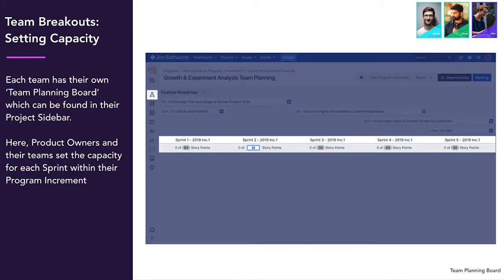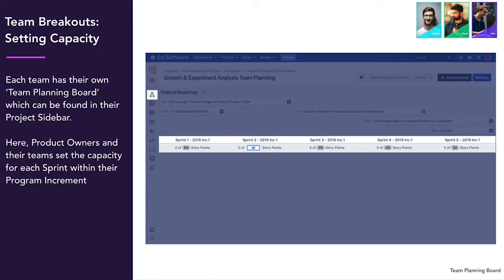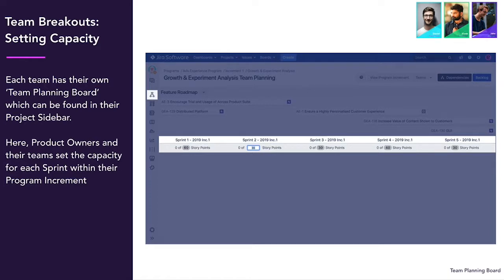Next, team breakout sessions are where each team can take ownership of their work. Product owners work with their teams to set capacity for each sprint. You should consider things like holidays, annual leave and upcoming business events which may affect your team's capacity. Once agreed, story point capacity can be entered directly into Easy Agile programs in JIRA.